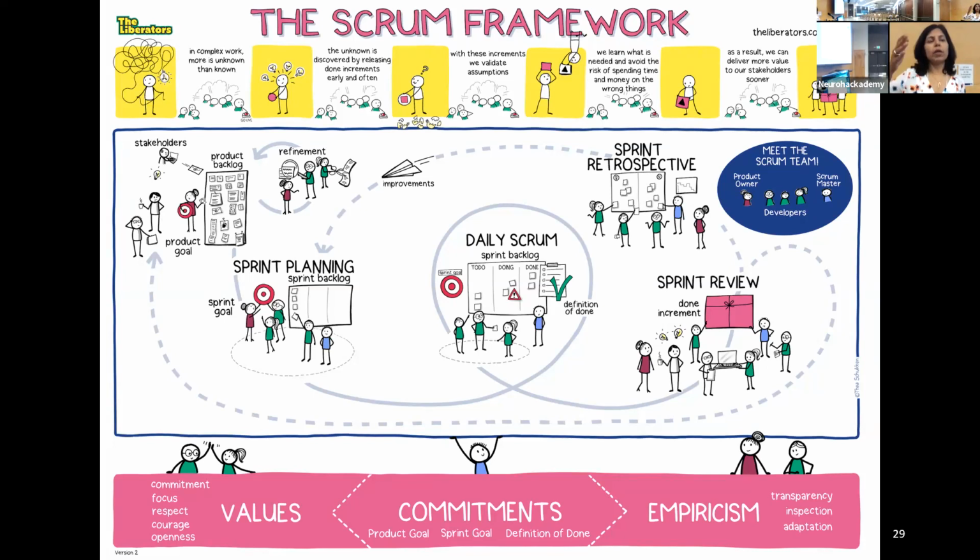Because it's very difficult to estimate, oh, that's going to take 7.5 days, or that's going to take 12 days. But if you think of it as, okay, there's enough unknown about this that it's going to be 40 story points, you need to break that into smaller units. So a good rule of thumb is it shouldn't be more than 2, 3, or 5 story points. And again, a lot of this now is on intuition.